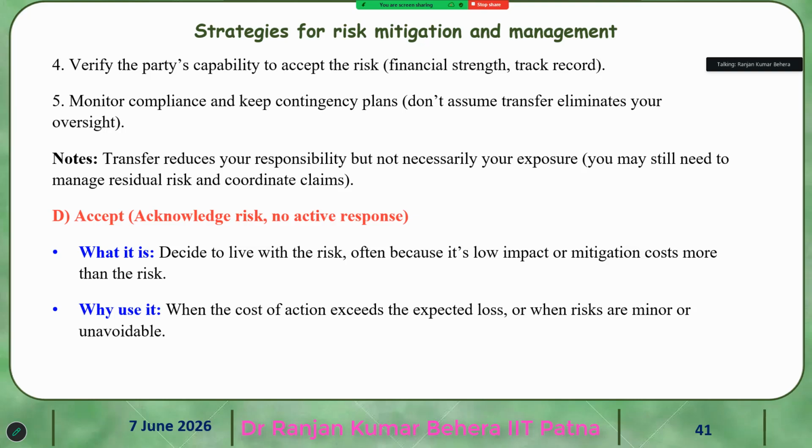Verify the parties' capability to accept the risk. One is financial strength and track record. And monitor compliance and keep a contingency plan.